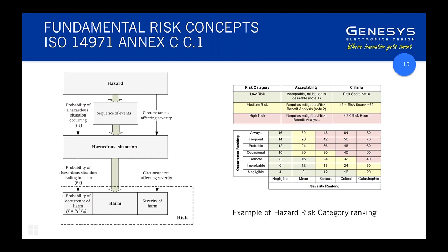Quite often you'll come up with something that looks like an absolutely horrendous risk because the probability is high and the harm is high. But you'll then find that there is a clear-cut mitigation that can reduce that residual risk to an extremely low level. And so you'll get much better brownie points from someone assessing your hazards analysis if you have a substantial number of medium and high risks on the first pass that have sound mitigations. That's a much safer pathway than saying, I'll just bump that one down a bit to get it green.